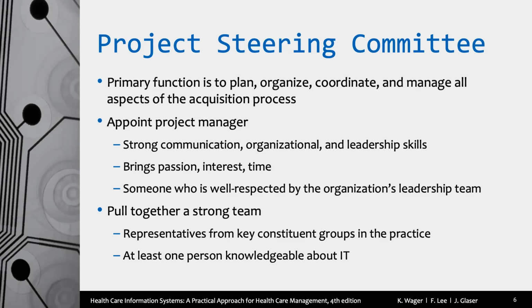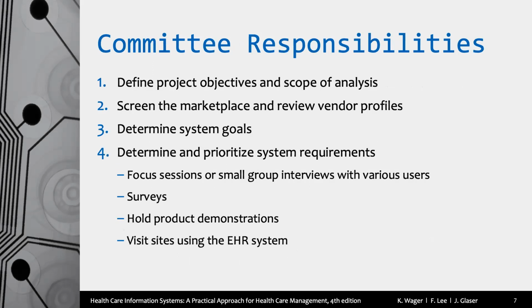Okay. We have to put together a strong team, and this is where it gets important. The text does a really good job here. It says at least one person has to be knowledgeable about IT. I'll be honest, when I did this early on in my career, we staffed the project with a whole bunch of IT people and very few clinical people. What we need is representation from everywhere. In my early days, when we would turn the software on, we would constantly hear from the clinical staff, it's obvious you didn't consult anyone from my area on this. Hard message to hear, but they were usually right.